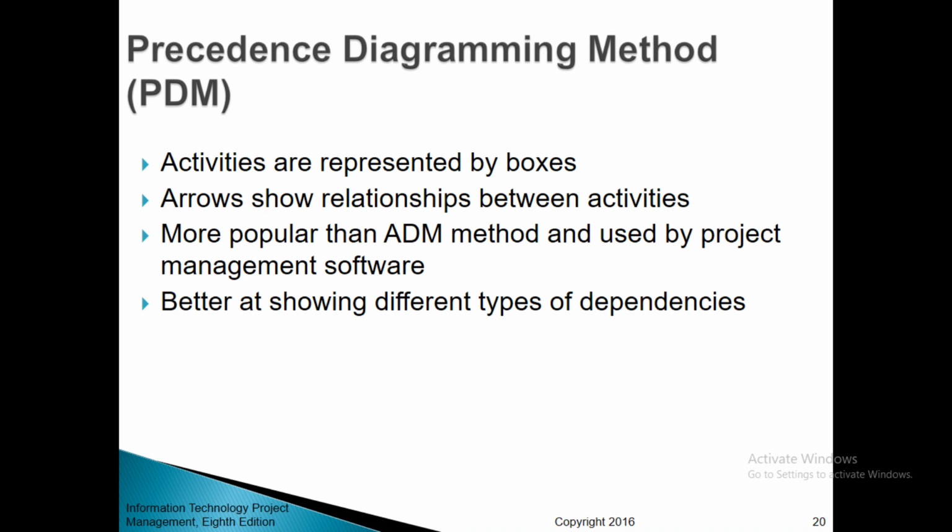Precedence diagramming method or PDM. Activities are represented by boxes. Arrows show relationships between activities. It is more popular than the ADM method and is used by project management software. It is better at showing different types of dependencies.